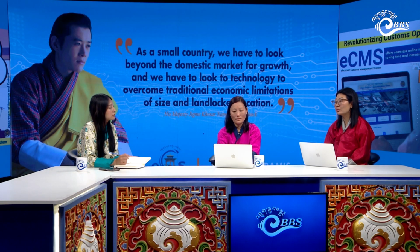Yeah, thank you for that question. I think that's a very important question, and the reason why we are here is to clarify these issues, why the truckers were stranded in MDP, especially in Phuentsholing. Like I highlighted earlier, we are in the piloting stage. At the initial stage of piloting, what had happened was people were not aware of eCMS. They were not aware that the prerequisite to using eCMS and declaring their goods in eCMS was to update their profile in RAMIS and use an authorized CFA to declare the goods. So the truckers and the traders were not aware of it, and everybody was lost initially. But I would like to say now things have improved along the way.